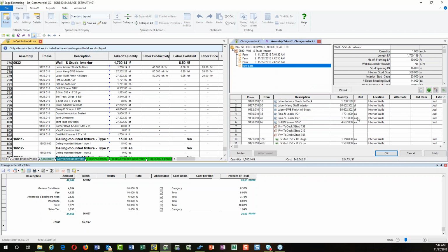Now, if I wanted to, we could also add a column in here and call it change orders and name it as a change order by adding a WBS code and have all the items that are as is, and then the change order one, so we can isolate those. There's about 3 or 4 different ways I can merge this back into my estimate and have it replace this. There's a lot of different things that we can do to handle a change order.